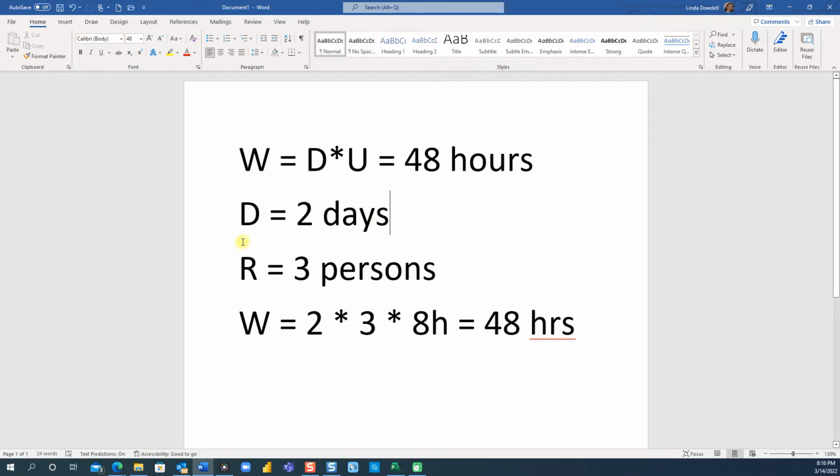initially when you start entering task estimates, then later you begin adding resources and say you add 3 individuals. The work effort for a task is based upon the duration, the resources, and the hours per day.